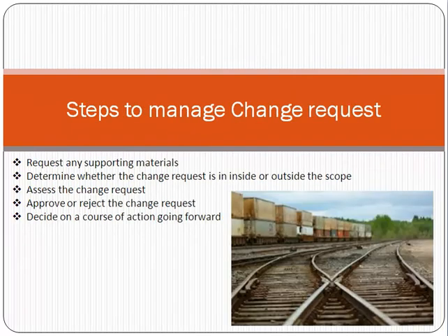Now, steps to manage the change request. Friends, first of all, we need some supporting document or supporting material from the customer or the internal team, like an email or a Word document, showing that this change is required. It is very important that you get written material, meaning an email, a document, an Excel sheet, something in a written format. Ask the customer or any other stakeholder to provide the change in written format, because what is written has lots of value.